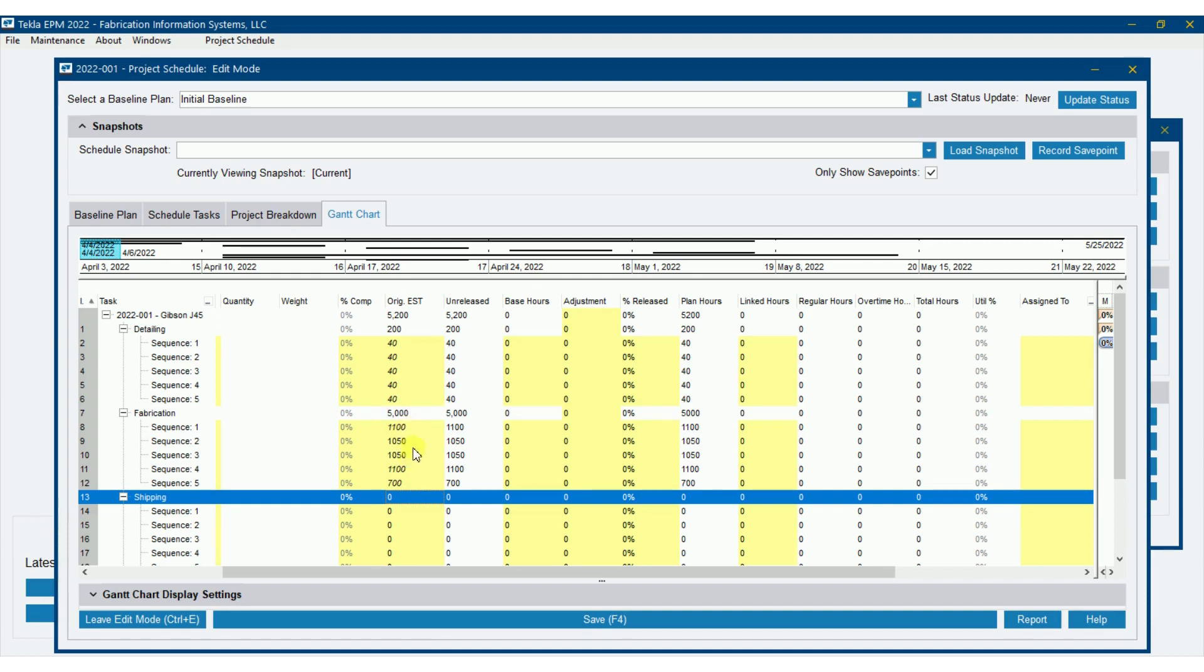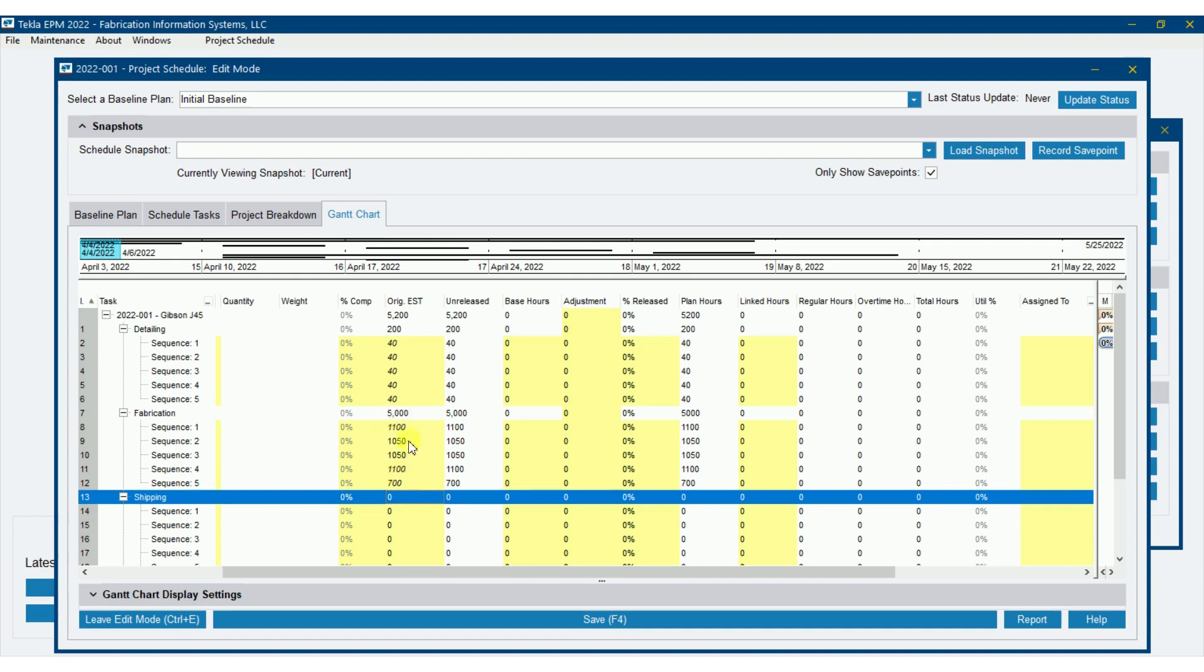So original estimated hours, you'll need to fill that in. It does not pull over from the estimate. I get that question quite a lot from clients. It does not pull over from the estimate. For one thing, probably you didn't know sequences at the time, so you probably don't have your breakdown that way. Most fabricators would not. Some I know do, but it does not pull over. So just by filling that in, you'll see that the unreleased has automatically filled in. It knows that the production control job that we have, we haven't imported anything into it yet. So it knows that all of these hours so far are unreleased hours, which will come into play on our production schedule as we move forward.